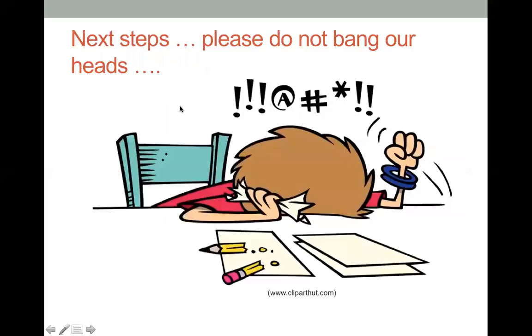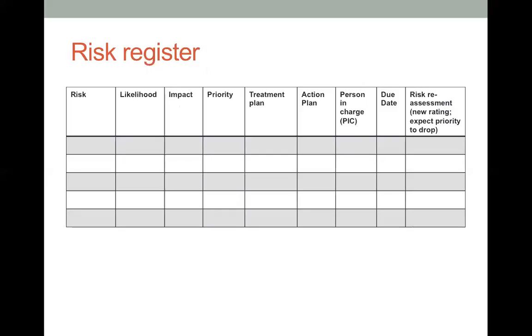So let's say we launch a new product and we need to analyze the risks, and one of the risks that may occur is our competitor reducing their price by the time we launch the new product. So in here, the risk would be competitor reducing the price. Then we analyze the likelihood. What is the likelihood for our competitor to reduce the price? Well, probably quite little, let's say as little as 2.